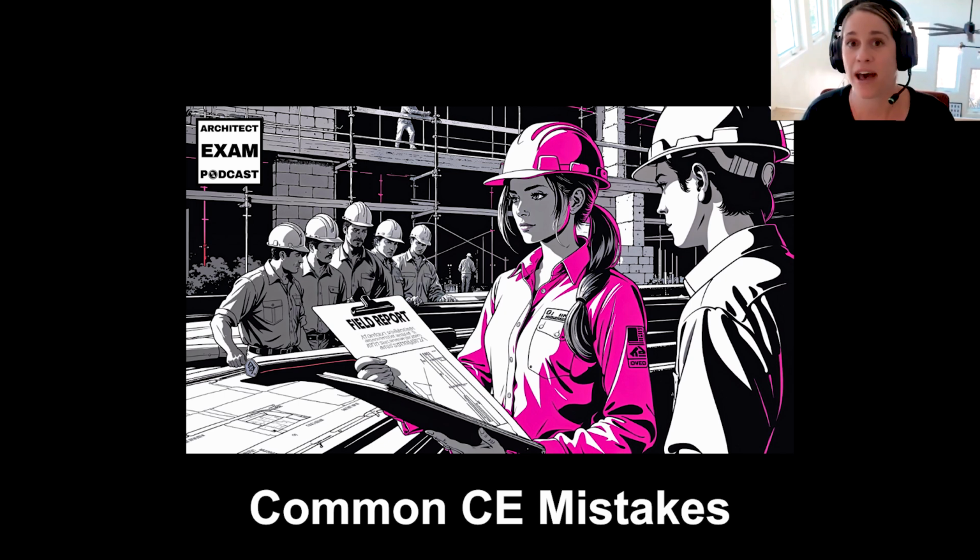And I was able to fall back on that information and say, I think that the roof membrane that was installed is failing because it was applied while it was raining, which just leads to bubbles and air within the membrane, which can lead to the roof failing, et cetera, et cetera. Long story short, I didn't refer to those documents until like a year after the roof was installed, but I was able to use it as a record to kind of argue the case against improper installation.